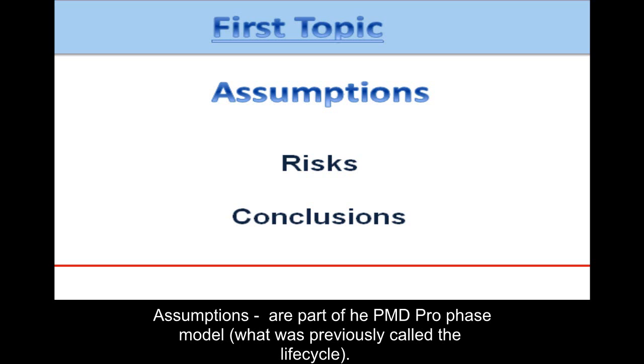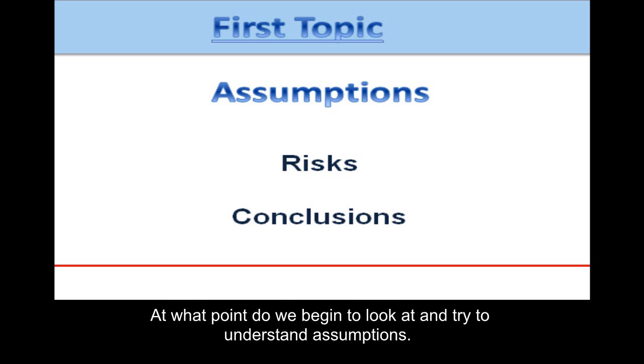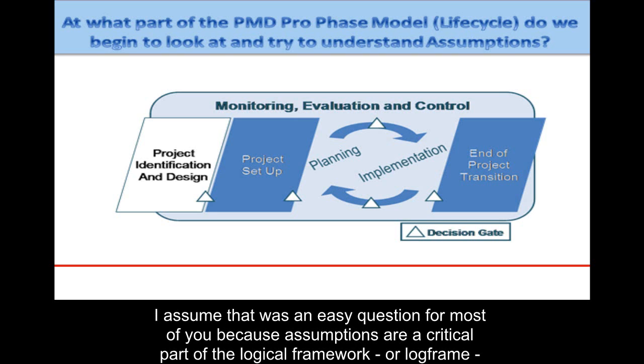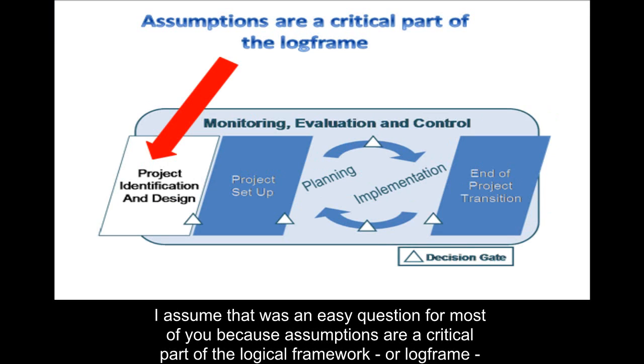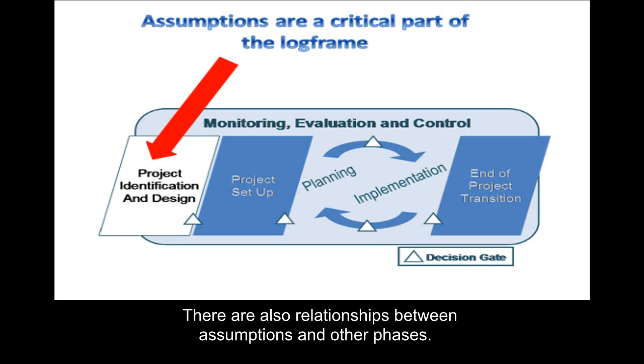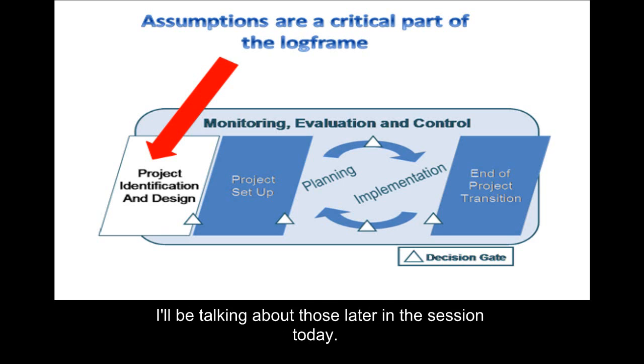Assumptions. As part of the PMD Pro Phase Model, what was previously called the Lifecycle, at what point do we begin to look at and try to understand assumptions? I assume that was an easy question for most of you, because assumptions are a critical part of the logical framework, or the log frame, which is first done as part of the proposal in the project identification and design phase. There are also relationships between that phase and the assumptions with the other phases in the model, and I'll be talking about those in this session today.